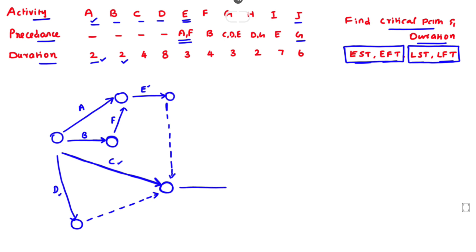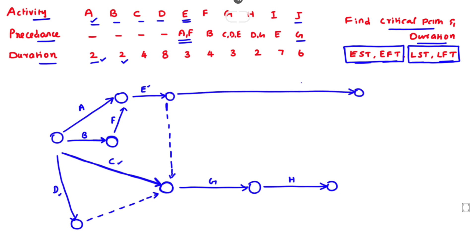Here is activity G. Next is activity H — its precedence activities are D and G. Here is the D activity and here is the G activity, so we draw H connecting from them. For activity I, the precedence is only E. Activity J follows, and we close the network by introducing a dummy activity to properly terminate the network at the end node.